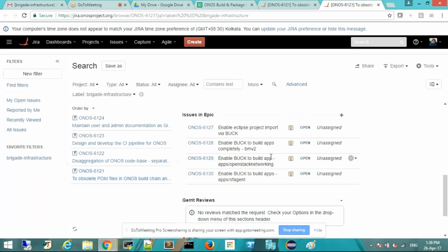Then we enter the sprint with the tasks that we've scoped in for that period of time. We have periodic meetings, whether bi-weekly or weekly, where we talk about people's progress, see if there are blockers, and find out if people can help in certain ways. At the end of the sprint, we look at what's been accomplished, move all that work into completed, and then scope in the next set of work.